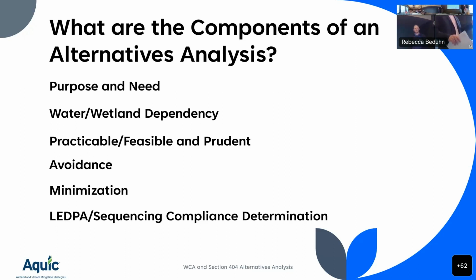The purpose of the purpose is to define our range of alternatives, because every alternative that we consider has to achieve that purpose. Just in your mind, think of the example I gave, single family housing in some region where you determine there's a market, there's a need. If the purpose is overly restrictive, like 200 units at the corner of First and Main, there's one alternative that can achieve that. You can't do an alternatives analysis because there's only one that'll achieve that purpose. So it's too restrictive a purpose.